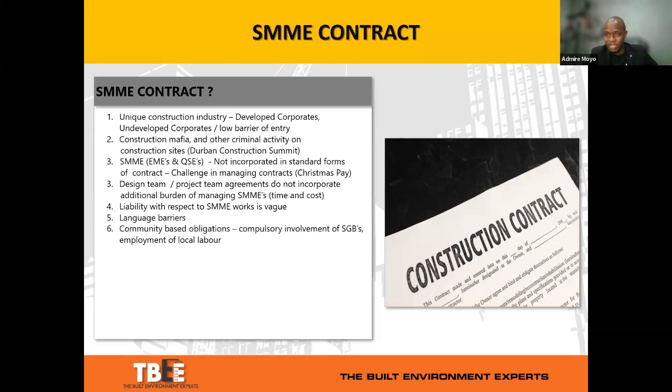It also acknowledges that whoever is involved in the management of SMME contractors, whether from the design team point of view or the contractor's point of view, needs some sort of remuneration as part of the total project cost or project fee.